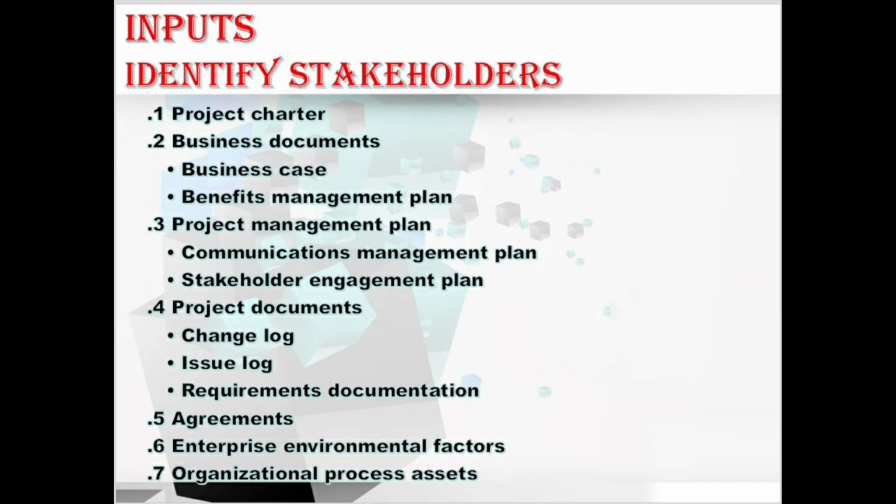Moving to the next input, project documents, which contain the change log, issue log, and the requirements documentation. Let me explain one by one. First, the change log. The change log may introduce a new stakeholder or change the nature of an existing stakeholder relationship to the project. Moving to the issue log.